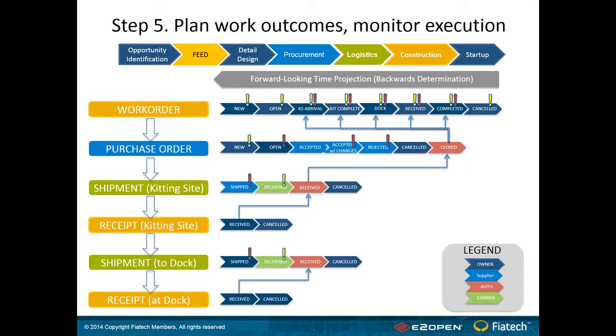if a non-event is detected, or a delayed event is detected, whether it be around service requisitions or whether it be around material moves. How can you assess whether that particular event or non-event is on the critical path? And if it is, how do you go about resolving it in the network? If it is not on the critical path, then you essentially have enough slack in the overall plan to not pour in money and maybe run an expedite on that process.